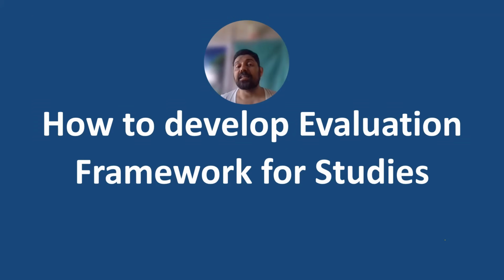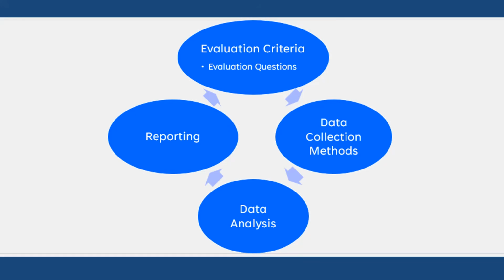When you are starting in evaluation, you need to develop an evaluation framework. If there is a project, you will need to develop the evaluation framework. That evaluation framework will have all those components: evaluation criteria, evaluation questions, data collection methods, data analysis plans, and then reporting and communication.